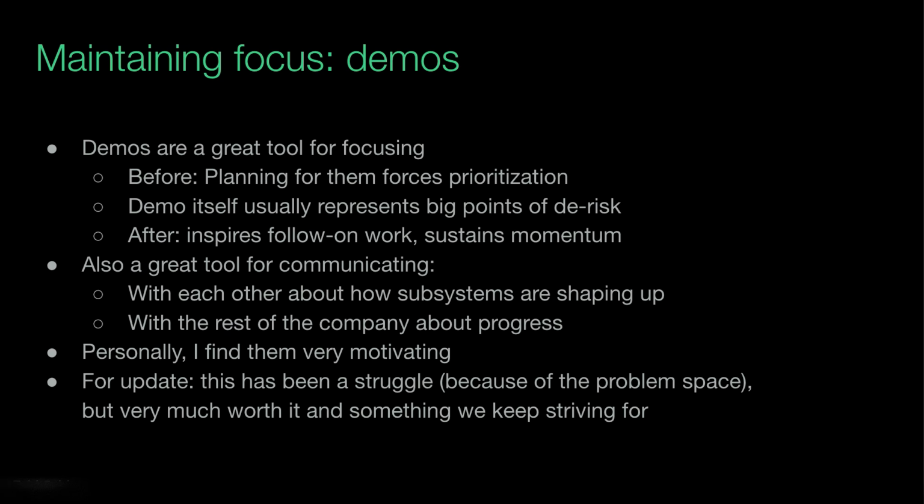Okay, I want to talk a little bit about demos. I think this is kind of preaching to the choir for most people here, but I do think it's worth saying out loud. Demos are such a great tool for focusing, because before the demo, you do a bunch of planning that forces prioritization. And the other asterisk I want to say about this is there's a difference between I just demoed something cool, which is cool and great, and I really don't want to discourage that, versus I'm demoing a milestone that is on the critical path to the thing that we're doing and is something that's ready to land on main.